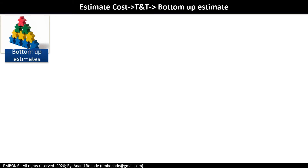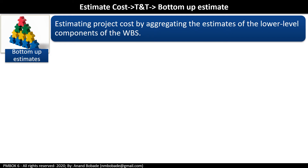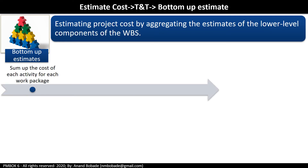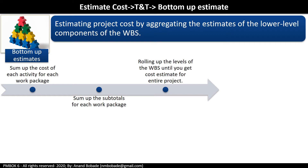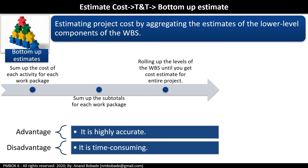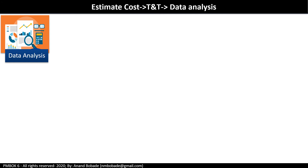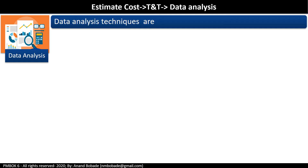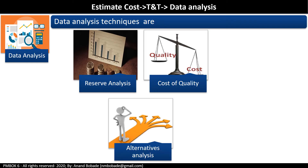Bottom-up estimation: you estimate project cost by aggregating estimates of the lower-level components of the work breakdown structure. First, sum up the cost of each activity for each work package, then sum up the subtotals for each work package, and roll up the WBS levels until you get a cost estimate for the entire project. The advantage is high accuracy; the disadvantage is it is time-consuming. It is the opposite of top-down techniques like analogous and parametric estimation. Data analysis tools include reserve analysis, cost of quality, and alternative analysis.